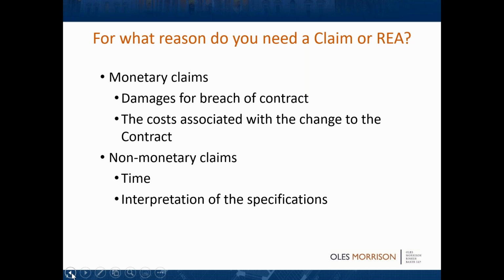the contract. There are also what are known as non-monetary claims, such as you've been delayed a certain number of days, and you need that additional time so that the government doesn't assert, say, liquidated damages. Sometimes also you need interpretation of the specifications or other non-monetary claims.